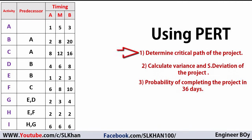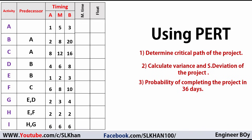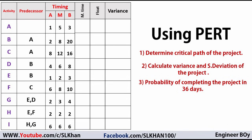The first thing is to determine the critical path of the project. In order to do that, we need the mean time — these three types of times together can't work directly for that. So we need the mean time. We're gonna add these values and divide by the number of times to get the mean time. I'm gonna add a few columns to the table: mean time, float, and variances.